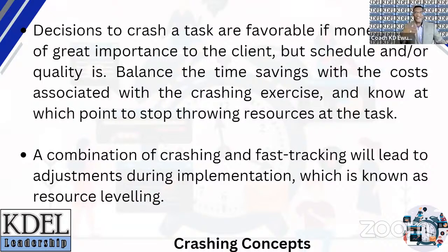So when you have 3 tasks that are in series with each other, you want to select that task first and get it done. So in the case of our example, you want to select task C first because it has a minimum slack. After that, you select task B, which has a slack of 2, which is lower than task D's slack, which is 3. Task D, therefore, will be the last of the 3 tasks to be resource leveled. Now, if for any reason the slacks are the same, we should break the tie by selecting the task with a shorter duration.